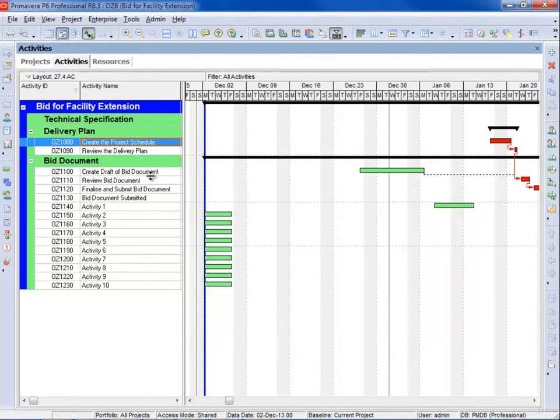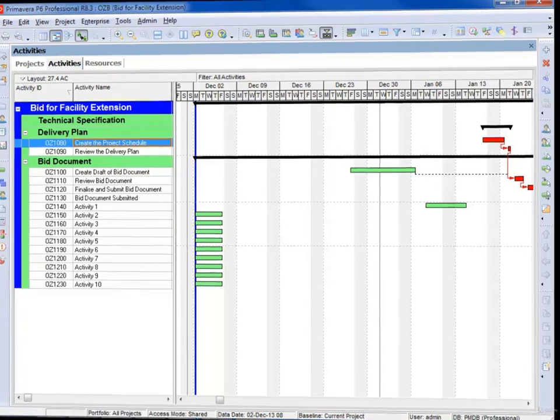So with an Excel spreadsheet, if you want to bring it in, any calendars, activity codes, resources, all of that sort of thing, WBS nodes must exist before you import. So it only enables you to bring in data against an existing project with existing attributes to import against.